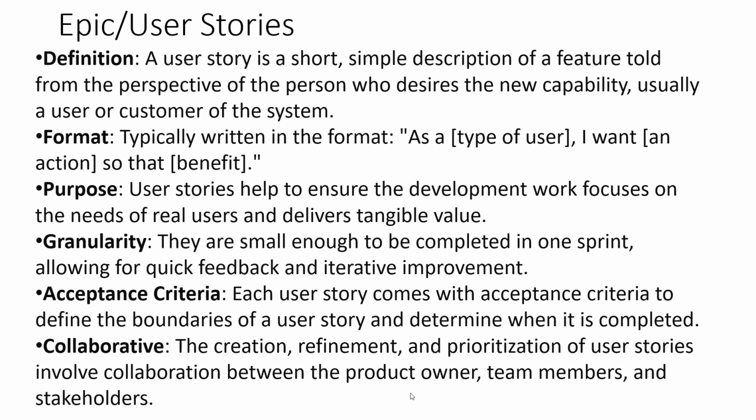Now, those user stories. A user story is a short, simple sentence or two to describe, from the perspective of a person who needs the new capability, what they need to be able to do and how they would describe it. The format is typically written as: as a whatever type of user, I want to do something so that it will give me this. And we'll show you some examples of these sentences. But these are typically English statements saying who you are, what you want, and why you want it. And then based off of those, we can look to use those stories to focus the work to define the needs of the real users, the people who actually will gain the benefit and the value from them.